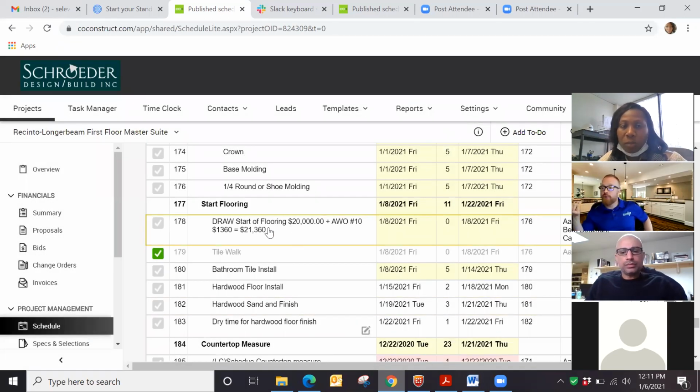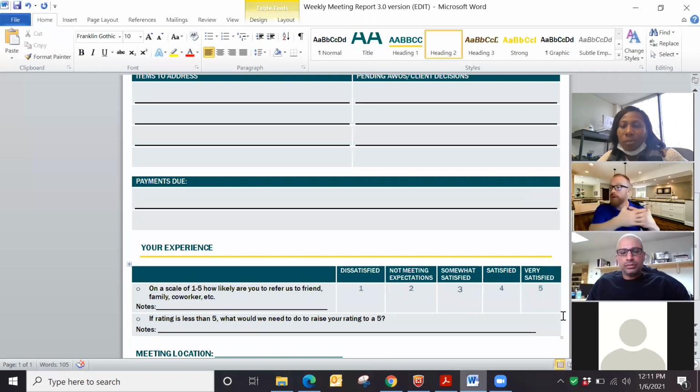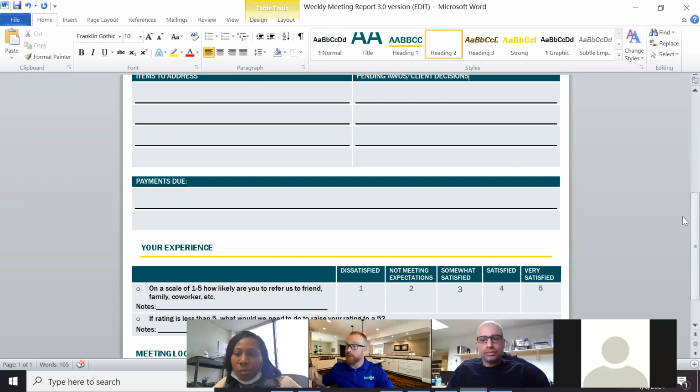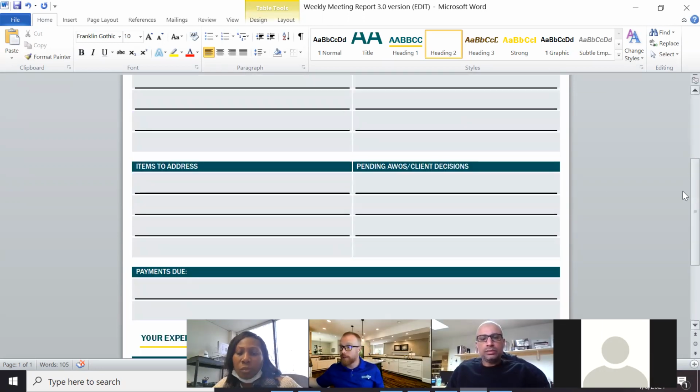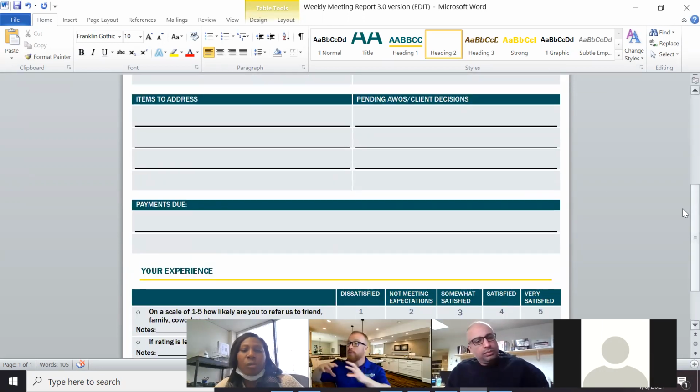The PDs have been trained on this, and all AWOs get assigned to the PDs to approve, right? So they're aware when something gets approved, and then their follow-up is to go put it on the schedule, and then also do all the backup and the coding, and then turn that over to Beth. So that's part of their AWO wrap-up. Correct. So this is part of their AWO process.